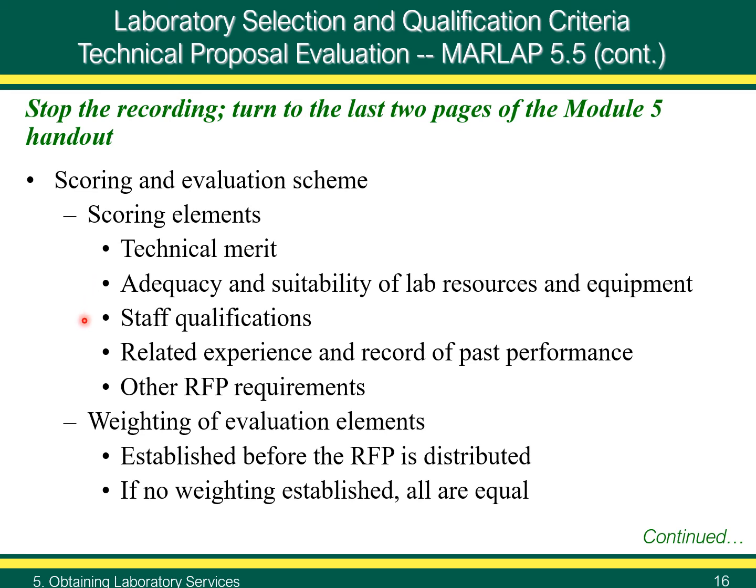Staff qualifications. The RFP should require the identification of key technical staff and their duties, along with their educational background and experience in radiochemistry, radiometrology, or laboratory operations. The laboratory staff that will perform the radiochemical analyses should be employed and trained prior to award of the contract.